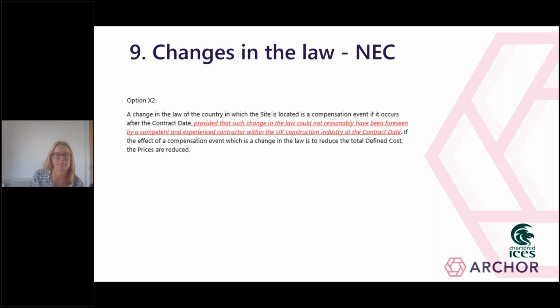So the amendments that you can see on the screen try and water down that risk to the client by saying that there will only be a compensation event in the event that such a change in law could not have been reasonably foreseen by a competent and experienced contractor as at the contract date. Now, the X2 is a secondary option, so you actually have to include it within your contract data for it to be incorporated. There is no definition in the NEC contract as to what amounts to law, and